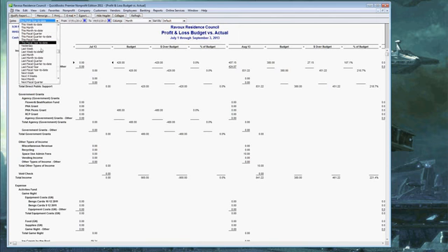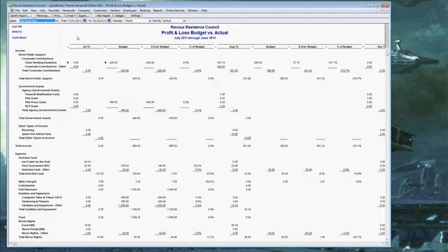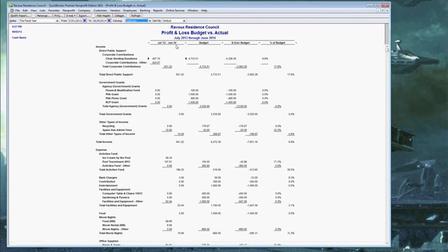We want to go to this fiscal year because that'll show us all the projected expenditures for the whole year. We want to go to columns and click total only, because instead of by month, it'll give us just four columns for the whole year, and then the budget for that year. If you're over budget or under budget, a negative number means you're not over, you still have money to spend, and for percent of budget, anything greater than 100%, you're in trouble.